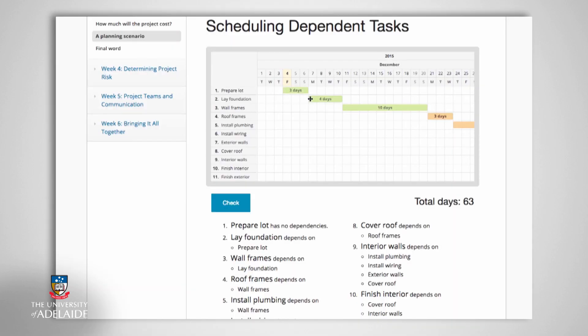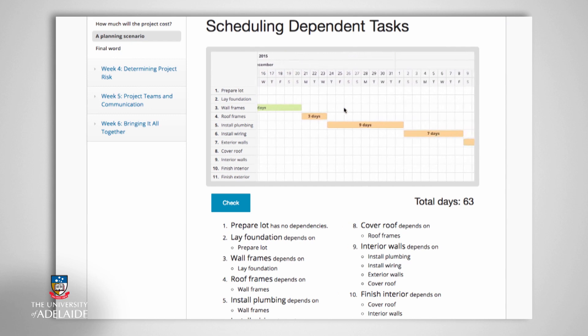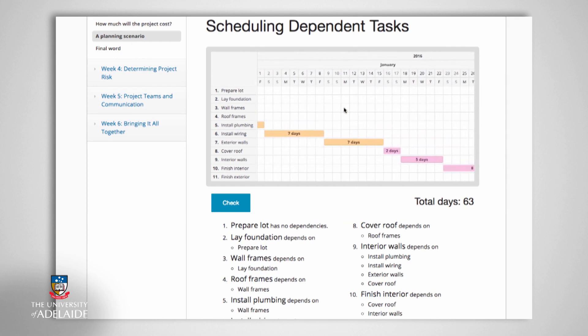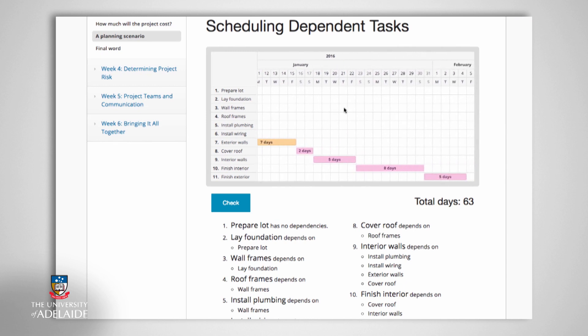You will notice that each activity follows the last in a back-to-back manner. While some activities are reliant on others, and it is possible to work in this manner, it may not be the most efficient way for a project manager to proceed, as each relies on the completion of another.